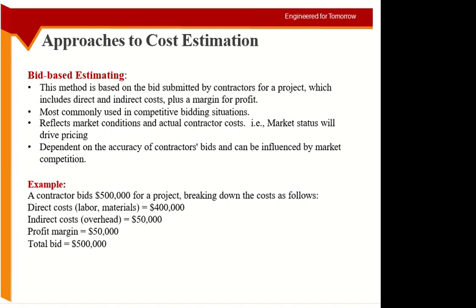But in competitive bidding, this is what in essence it means, that we are looking for the contractor who will give us the lowest cost. In this case it is very close to the market prices. It gives you a true estimate of the market prices, because it's given by the contractor. So he is the guy who has an idea about the material, he is the guy who has an idea about the labor, because he is using these things day in day out on all the other projects. So when this guy says cement is this much, he already has a fair idea about it.